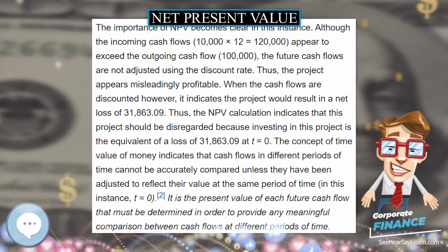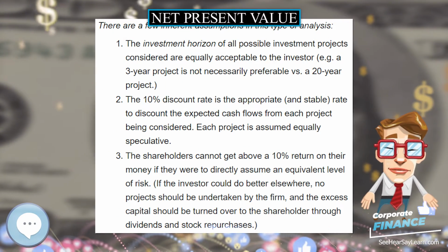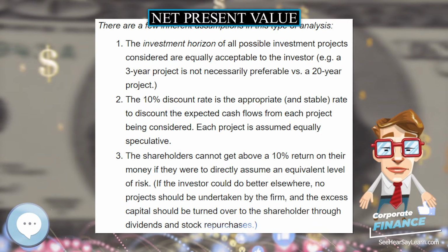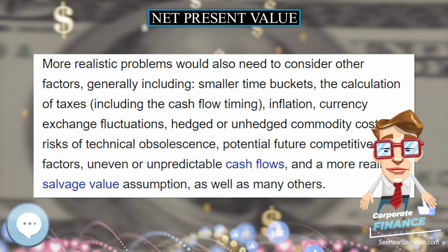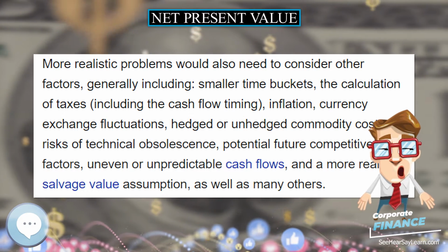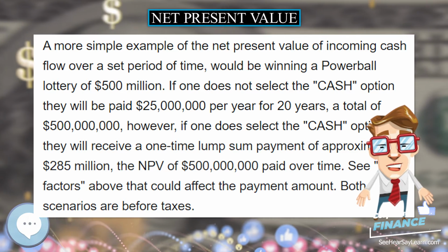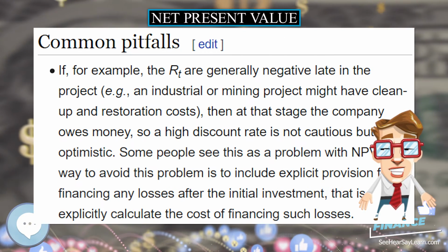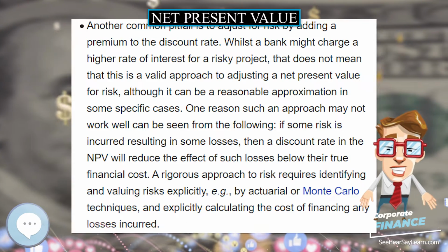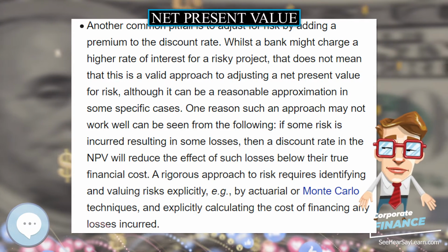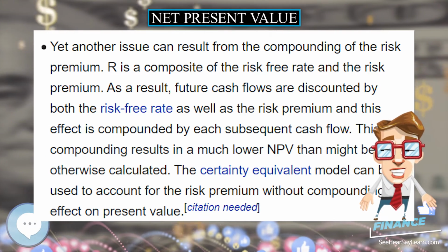Use in decision making. NPV is an indicator of how much value an investment or project adds to the firm. With a particular project, if R_t is a positive value, the project is in the status of positive cash inflow in the time of t. If R_t is a negative value, the project is in the status of discounted cash outflow in the time of t. Appropriately risked projects with a positive NPV could be accepted.